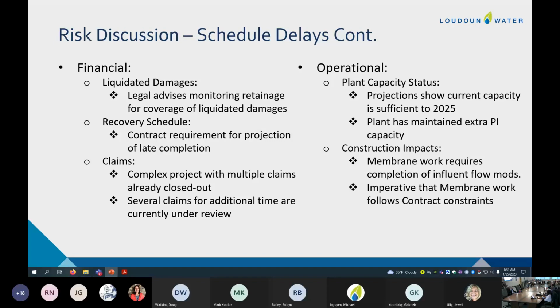When we say the 11th change order, does that relate to what you just spoke of, the time aspect? Yeah, so we're working on the next change order, and we're hoping to resolve the time associated with the milestone 5, as we call it. That's the flow storage and delivery facilities. Gotcha. That's the early milestone and the prerequisite for the membrane work. We're hoping to resolve that with the next change order.